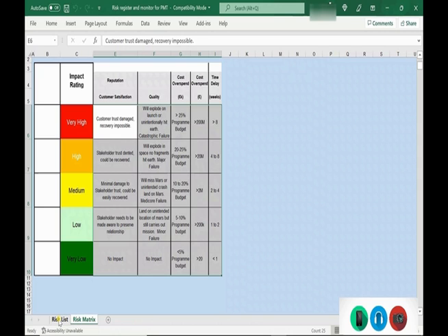You may want to do that in isolation, or you may want to just bring key stakeholders into the meeting and start opening up the question and actually having a risk session which you facilitate, or ideally someone outside of the project facilitates, because then they can start questioning aspects of the project which maybe people haven't thought of because they're inside the project. I've always gone for bringing stakeholders in, but that's up to you. So now you're sitting in a session. So let's say you've done it with a team or in isolation.